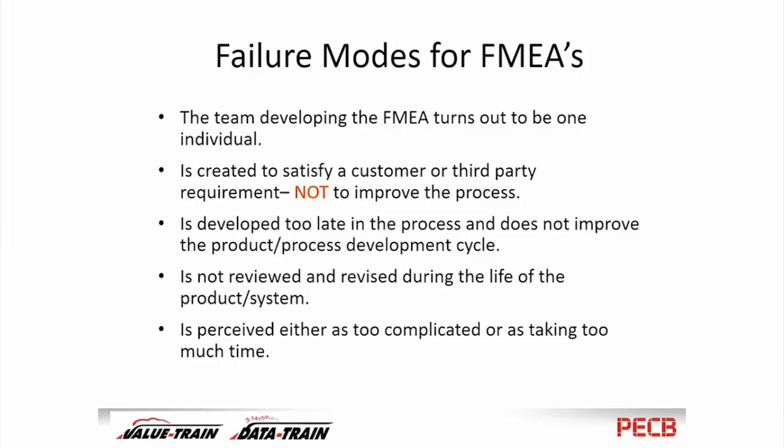This FMEA document and the resulting papers that come out of it are supposed to be what we like to call a living document. That is, we don't make it once and stick it on the shelf, but we review it periodically to see how it changes over time. So over time, the riskiness of our system or our product should be going down as we apply energy to it. So if we don't review it, we don't revise it, then that's considered to be a failure mode of the failure mode analysis.